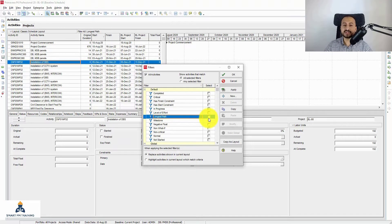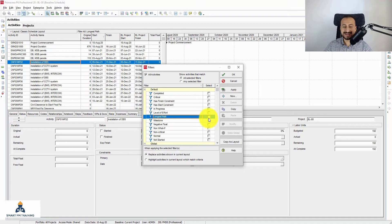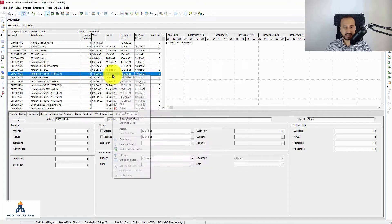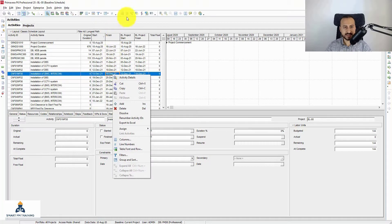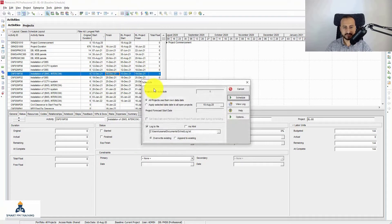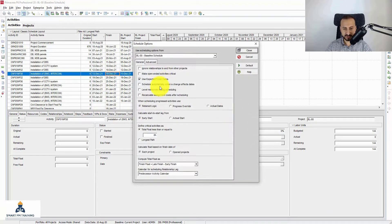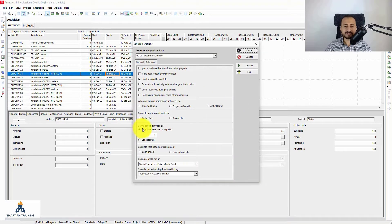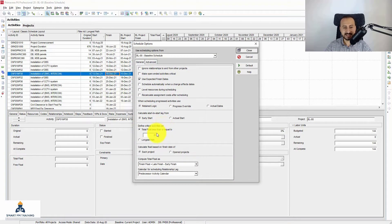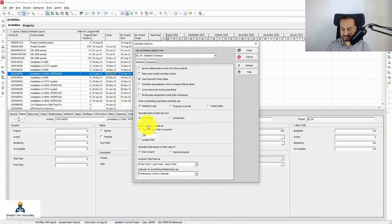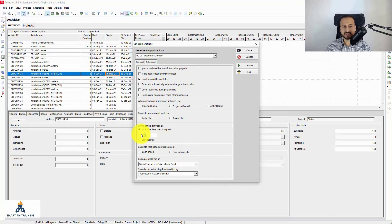By Primavera definition of critical activities, you can go to the settings. If you go F9 or schedule option and you go to options, you will have here 'define critical activities as' so total float is less than, may say for example is less than or equal to zero hours or whatever value you specify.